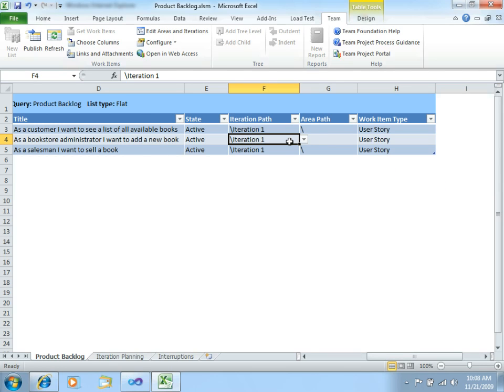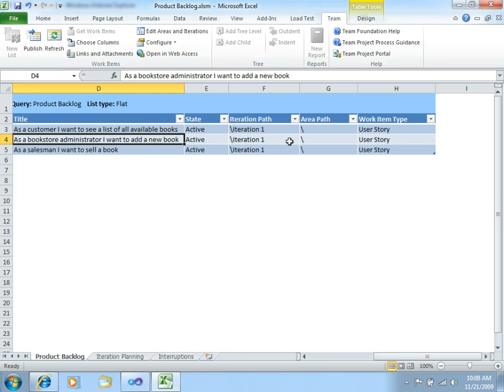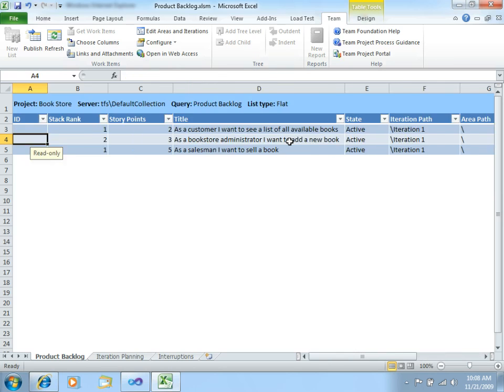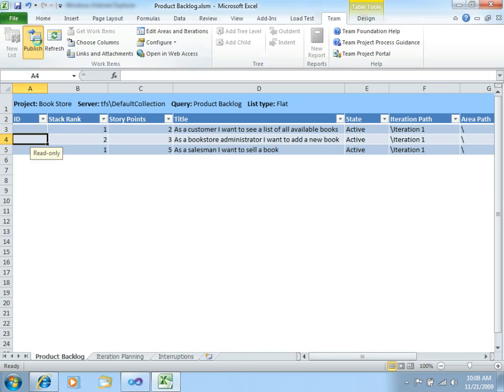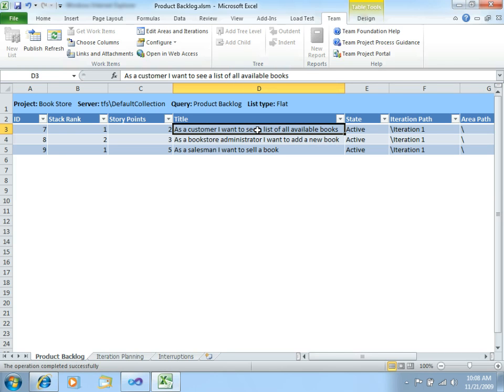So, having this, the only thing that we should do right now is to publish these three new User Stories, which are work items, to Team Foundation Server. So, you should go to the Team tab in Excel, and then click Publish. What this will do is to publish each of the three work items to Team Foundation Server, which I already did.